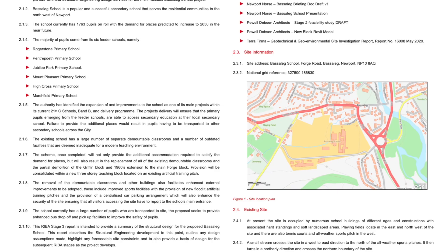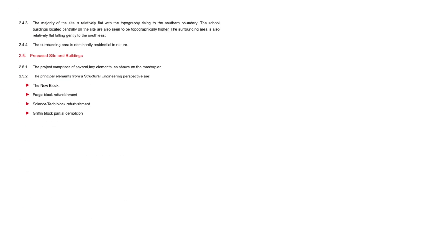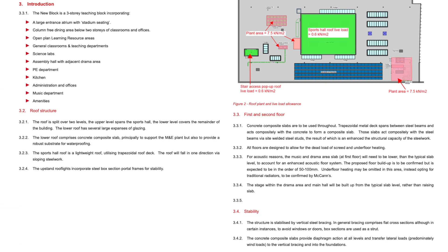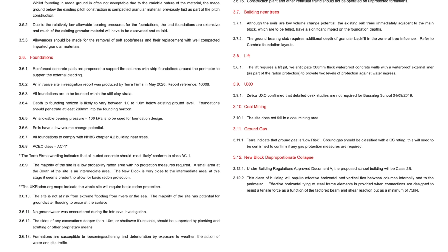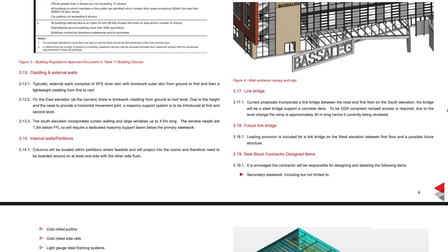The scheme stage is very important for catching and highlighting any significant risks or hazards. In terms of deliverables, I would expect for most projects to produce a structural scheme, developed after discussions with the architect — going back and forth with ideas and options. I would also produce what we call a basis of design report, which captures the structural solution and highlights the risks, constraints, and what additional survey works are needed to progress into stages 3 and 4.